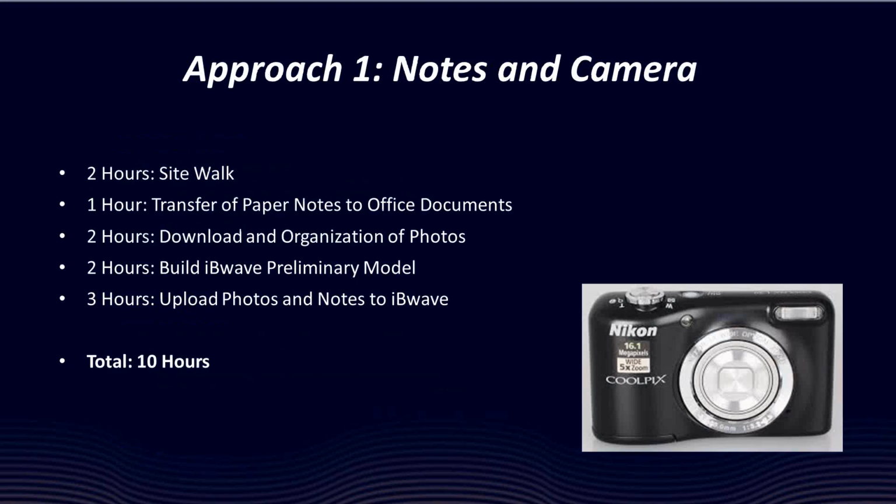So as we've gone through this path of improvement, we started in the very beginning shooting pictures and taking notes, as most of you have. We find the site walk is really the smallest piece of the time we spend in this process. A couple of hours on the site walk. When we get back to the office, maybe an hour to transfer the paper notes that you took and the sketches from your pad of paper into the network and the office documents that you use to store on your network. It might take 2 hours to download all the photos.